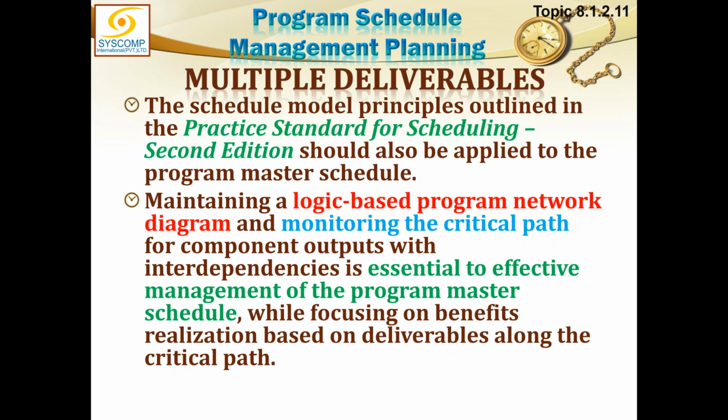So the practice standard for scheduling is not only for projects, it applies to the program also. So the master schedule concept is given there. Maintaining a logic based program network diagram and maintaining the critical path for component outputs with interdependencies is essential to effective management of the program master schedule, while focusing on benefits realization based on deliverables along the critical path.